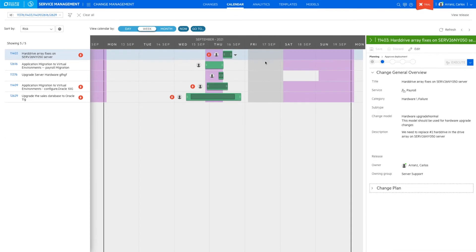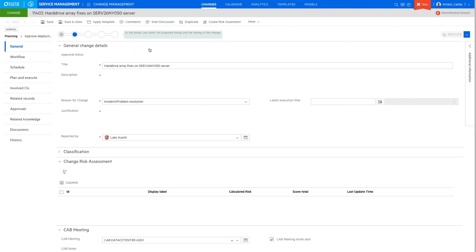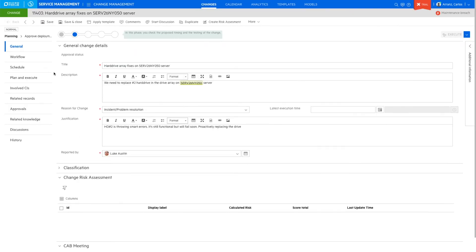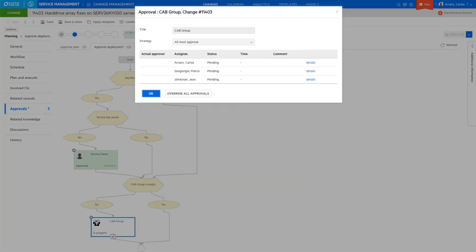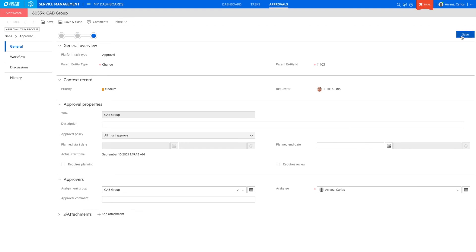Now during the meeting, the change manager will review all the changes, reschedule them if needed, and approve or deny accordingly based on the information shared in the meeting. Changes that are approved are automatically moved to the execution phase, ready for implementation on the scheduled date.